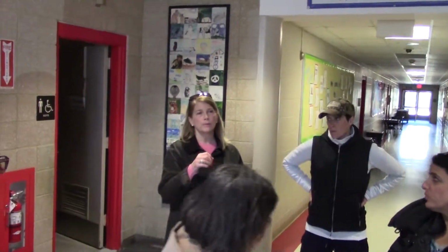We'll see what happens. Mike, is school security only reimbursable through a competitive grant, or is it also considered as part of a regular capital building grant process as well? If it was buildings you were building, like a guardhouse type structure, or totally redoing the front entrance of a building, it would be a capital project. It would have to go through the state capital vetting process.